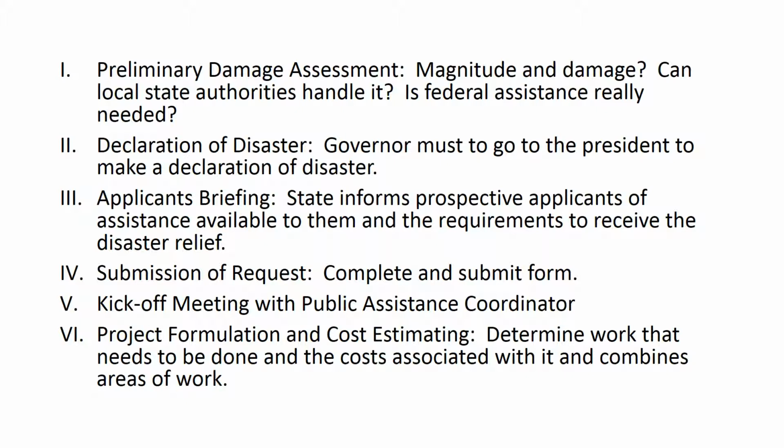Project formulation and cost estimating. This determines the work that needs to be done and the cost associated with that work. The work meaning the repairs and the project as a whole. Formulating a project would be combining areas of the points of work. So an example of this would be combining repairs of a water system that was broken at several points in the pipes into one single repair project.